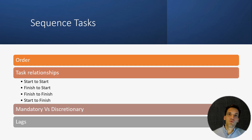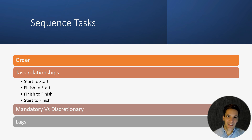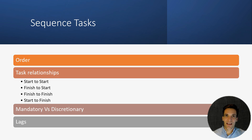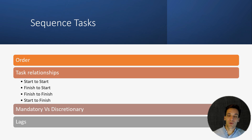Now that we've identified all the work that needs to be done and estimated how long each task will take, the final step is to put them in the correct order. Any project is going to have a defined sequence of activities. You can't just do all the work at once — there's some order to how we have to do it. For building a bridge, we need to do the foundations before we can erect the structure, before we can do the asphalting and roadworks. The sequence is going to drive the overall duration of the project.